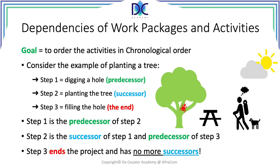You might ask: what if we skip step 2 and just dig a hole and fill it? This is not possible because our project is to plant a tree. You cannot go to step 3 unless you have the tree planted in the hole. You also cannot plant a tree without digging the hole first. This is the meaning of precedence information — the mandatory sequence of activities.